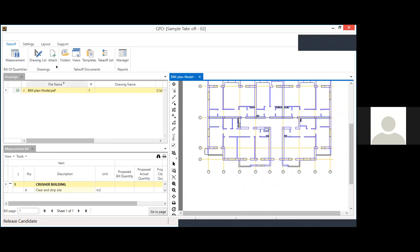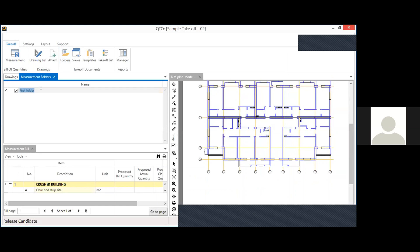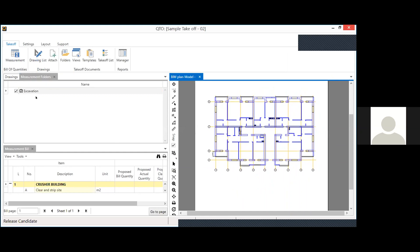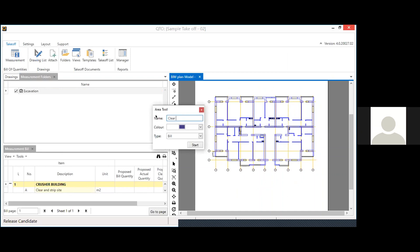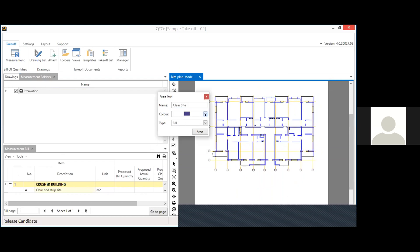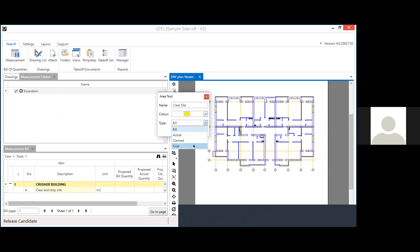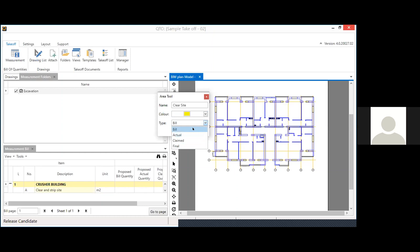I'll create a measurement folder — let's call it 'Excavation'. For all excavation work I'll take off quantities in this section. There is an area tool — click it, give the region a shading color. There are four quantity types: bill quantity, actual, claimed, and planning. During tendering you use bill quantities; during execution you have actual and claim quantities; and at project completion you understand the final quantity.